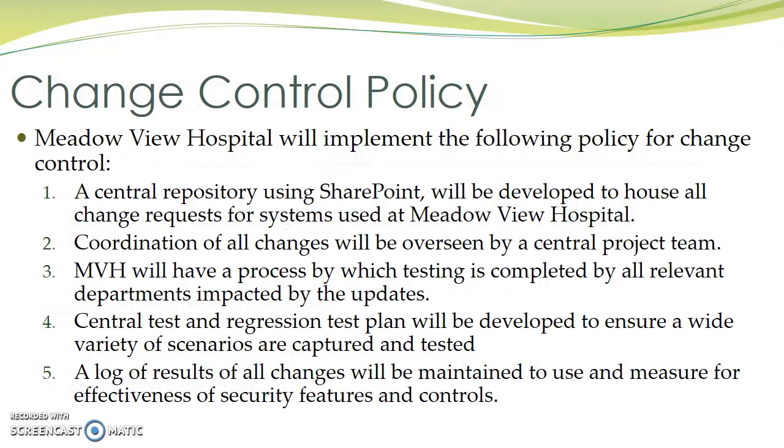Change control policy. Meadowview Hospital will implement the following policy for change control. A central repository using SharePoint will be developed to house all change requests for systems used at Meadowview Hospital. Coordination of all changes will be overseen by a central project team.